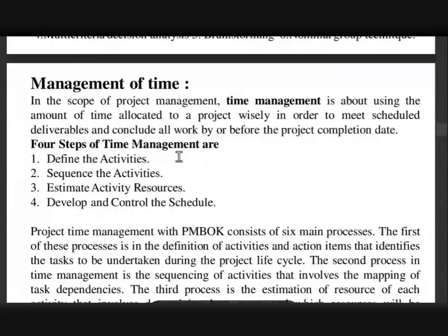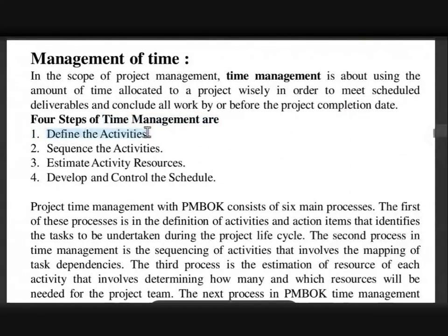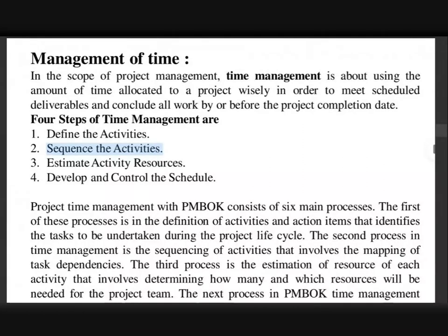Then management of time, it's about defining the different activities, then the sequence of the activities. If you want to do the painting of a building, first that building has to be constructed, the plastering of the wall has to be completed, then the putty and other related activities are to be done, then we will go for the painting. Okay, so this is how the activities of time management are done.